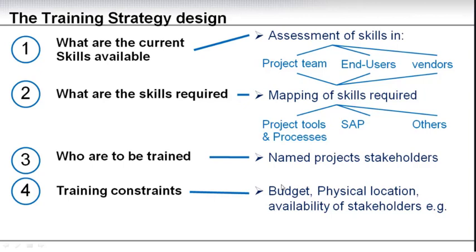An often situation here, which is really something you as the PM must ensure, is that you need to ask these questions. You need to probe into this training constraint, because you need to find out whether we are simply taking the people out for training 8 hours a day, and then after that those same people will have to do their daily job. That is not sustainable, and you will have people sitting mentally with their mind somewhere else, on the work they have to start after the full training day. Or if people are using their laptops, they might be sitting emailing or doing their daily work. So you really need to probe into the training constraint.